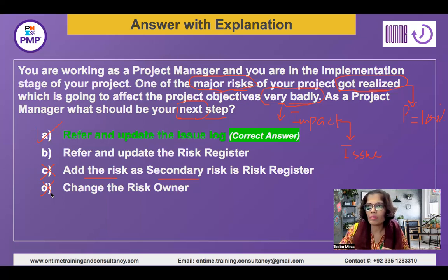So now the risk doesn't belong to the risk register. It doesn't belong to the risk owner anymore. Now it is going to belong to someone who is going to be the issue owner, right? So even if you are going to change the risk owner for this particular risk, this is something which is not going to be helpful. So this is not the choice.